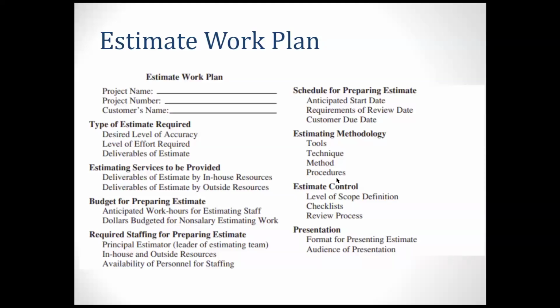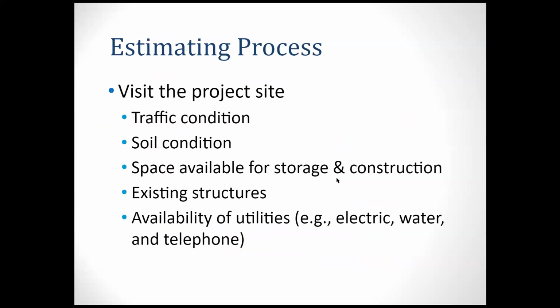So required staffing for preparing the estimate. You may have a principal estimator who leads the team. You may have in-house or outside resources at intern level, assistant level, right? And also you need any available person for staffing. So you may have multiple projects running in your company, then you may not be able to find enough people to do it, right? So you have a schedule. What is your starting day? What is your review day? And what is the due date, right? So estimating methodologies, tools, technicals, methods, procedures, controls, and also the presentation, right? So that is what will be involved there as a list for the estimating work plan.